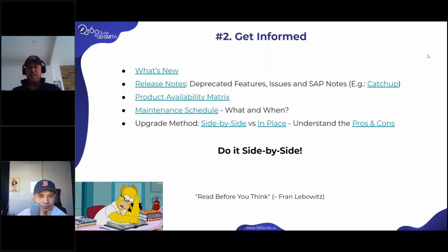The PAM is, as you know, I'm sure, telling you operating systems supported, browsers that are being supported. Well, if SAP stopped the support of something and you have not migrated that thing internally, well, you can't upgrade, right? If you have an old version of Oracle or SQL Server and your DBAs are not done migrating this thing just yet, well, too bad. You cannot go to 4.3. You need to wait. So again, it's not about just BusinessObjects, it's the stuff around it.